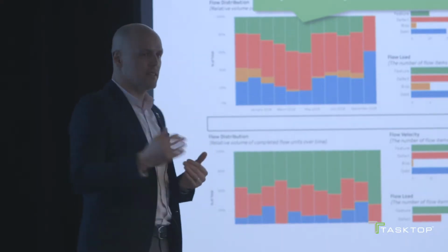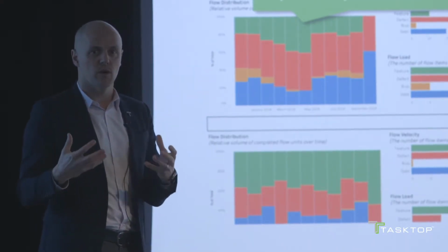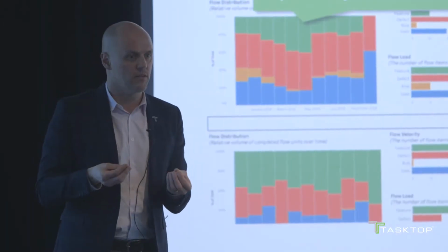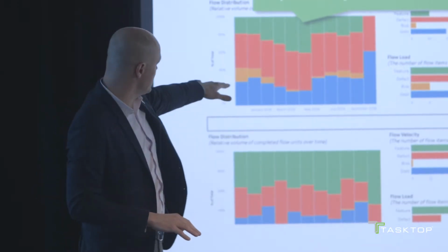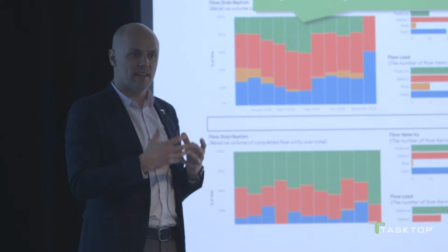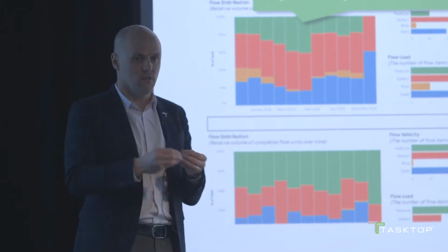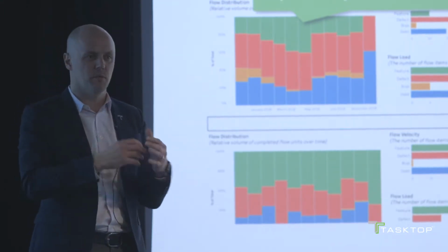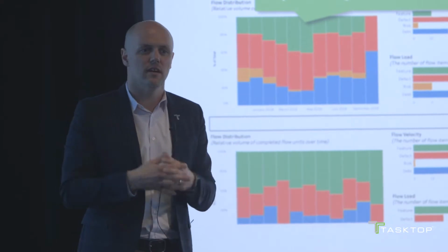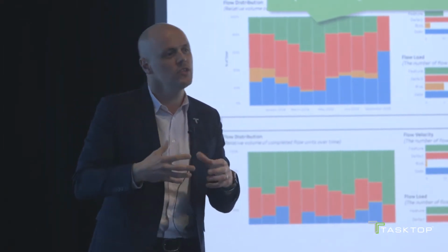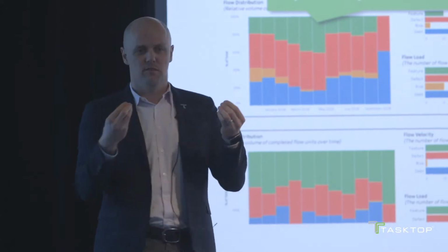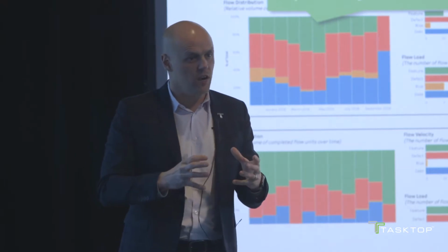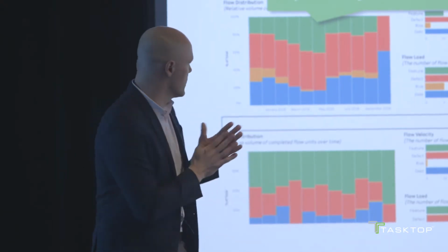But when that happens, the team's ability to do the work they know they need to do in order to enable us to deliver more features in the future goes down, because technical debt goes up. And you actually see here that they had to start working off that technical debt, and that the flow velocity of features suffered as a result. That part I understood when this was happening: we were going to go through another couple of quarters of more of a feature push, and then, because we understand flow distribution, the team would have enough of a chance to work off that technical debt after they got over some of those humps.